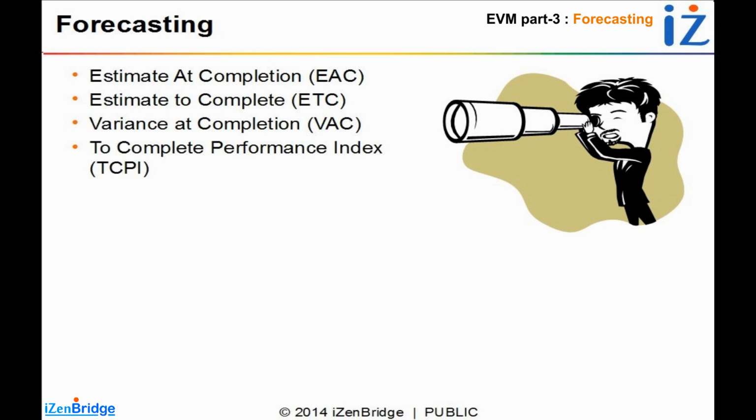So again, just checking our own project. We had a planned value of 400, at the end of third month our actual cost is 500, and our earned value is 300. At this point of time, schedule performance index is EV divided by PV, which is 300 divided by 400, is 0.75. Our cost performance index is EV 300 divided by AC, which is 0.6. So this is the current state. Now let's look at how we forecast the future on the basis of this data.